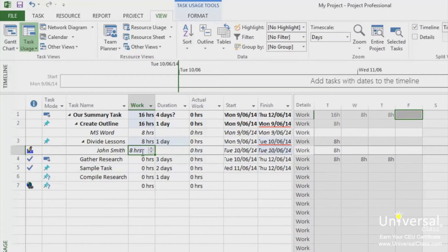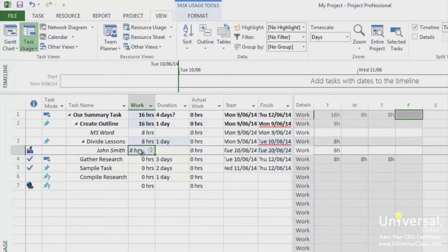To enter total hours, insert the column named Actual Work into the sheet. To do this, right-click on a column, select Insert Column, and then select Actual Work.